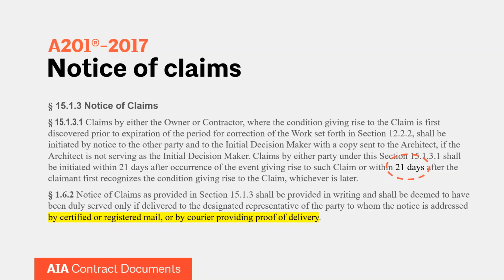And you certainly can resolve a lot of things informally, but when you get down to providing notice, do that the right way and comply with all the requirements in your contract. Second thing would be to really document all costs and all time spent due to delays.